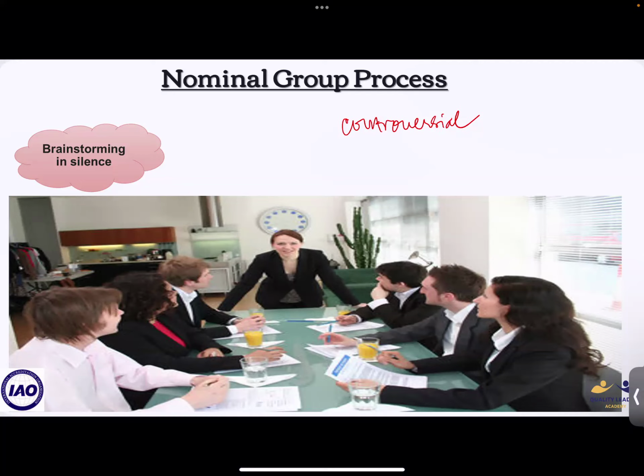Then all of you submit your papers to me, and I will read the papers and then discuss each idea one by one without agreeing on whose idea it is or whose opinion it is. This is called what? The nominal group process or technique.